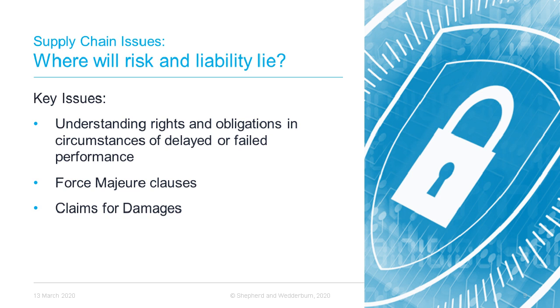Yeah, and we're going to look at the position for the UK today. As with so many principles of contract law, there's very little difference between Scotland and England and Wales here. So whilst the key cases that we're mentioning are generally speaking English, they've also been applied north of the border. This means that one of the first steps when reviewing your supply chain contracts is to try to identify the jurisdiction and the governing law clauses, because they're going to determine how the rest of the regime is going to be implemented.